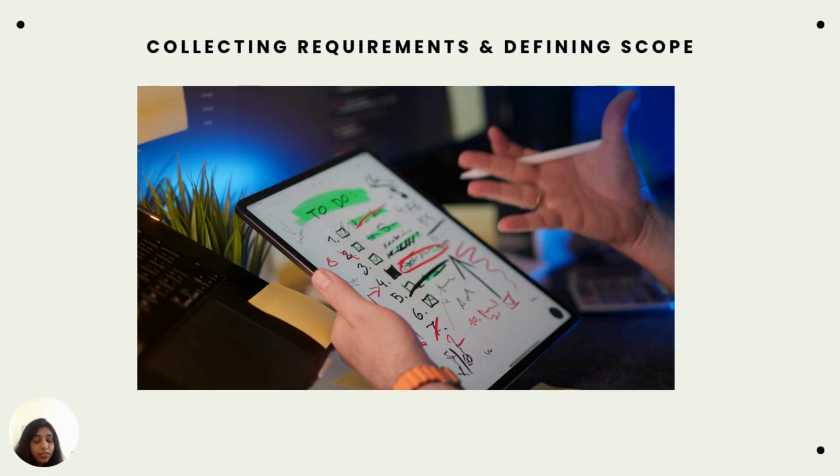This is critical for preventing scope creep. You must explicitly state what the project will not deliver. For example, we will deliver the software, but not the training manuals. So it must be stated clearly in the project exclusions, in the scope statement document.